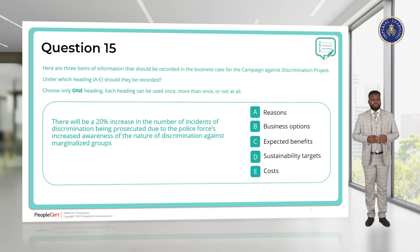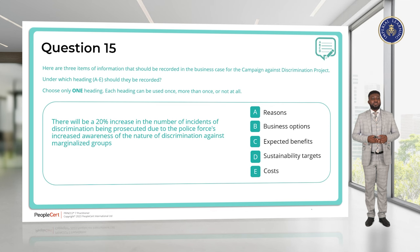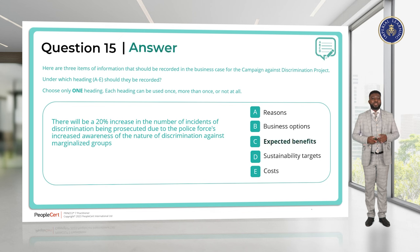Question 15. There will be a 20% increase in the number of incidents of discrimination being prosecuted due to the police force's increased awareness of the nature of discrimination against marginalised groups. Here we have something measurable — as a result of what we are doing, we know there will be a 20% increase in prosecutions. This measurable increase belongs under Expected Benefits. The answer is C.